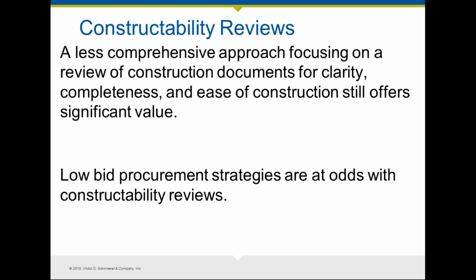Even if you don't have early input, I think it's important to be able to get feedback at any time, really, even if you don't get it early on in the design phase. A review of the construction documents for clarity, completeness, and ease of construction will still provide you with meaningful feedback, and the client with benefits and significant value.